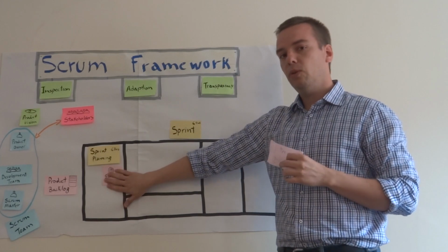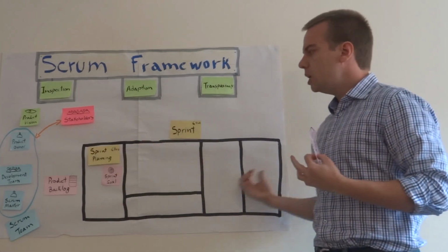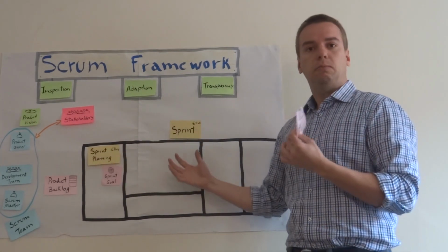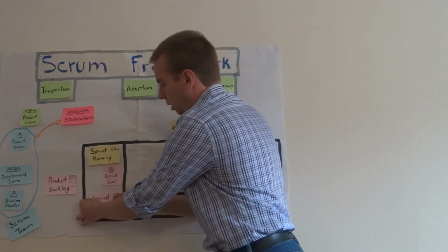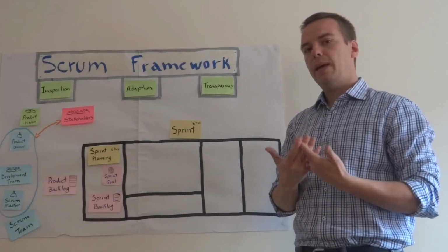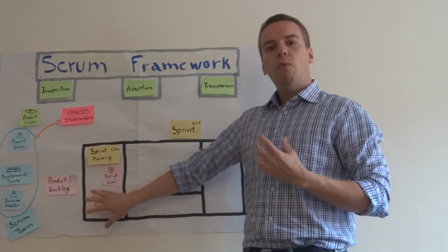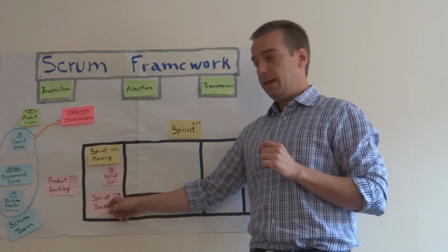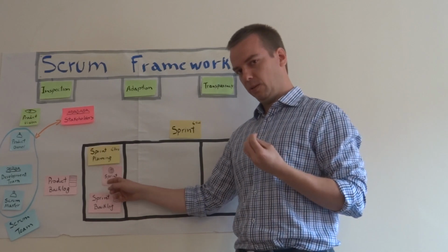So they're gonna create a sprint goal in the first part of the meeting, which means what we want to achieve, why we are running this up to 4 weeks, what underpins this. And also they're gonna create their sprint backlog, or the forecast, the plan, how they intend to achieve the sprint goal. The sprint backlog will be a subset of the product backlog plus the plan on how they forecast to achieve the sprint goal.